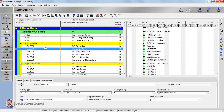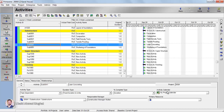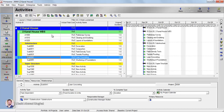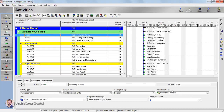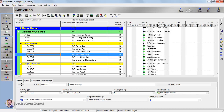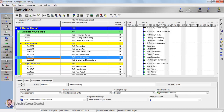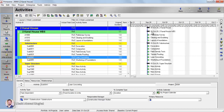If you click on any activity, you can see the calendar assigned is the one we assigned at the start of this tutorial — that's why I assigned it to the whole project. Otherwise, I would have needed to assign the calendar one by one to each activity. It's better to assign it at the project level. In the next tutorial, we'll see how to give durations and how to link activities with predecessors.